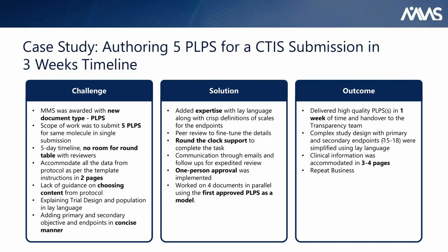To overcome these challenges, we worked on 4 documents in parallel using the first approved PLPS as a model. MMS added expertise with the lay language along with the crisp definitions of scales for the endpoints. Peer reviews were included to fine-tune the details. Round-the-clock support was provided to complete the task, and proactive communication through emails and follow-ups was done for expedited review. To fasten the process, 1-person approval was implemented.